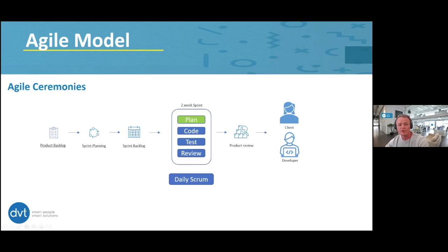So during the sprint, daily scrums are held, where developers provide updates and resolve any blockers or issues causing delays. This is a great opportunity for the Scrum Masters to check if the sprint is still on track. Scrum stand-up should be quick and take around 15 minutes. Any major issues are usually taken offline so as to not hold up any of the other developers. So the idea of the daily Scrum is to also promote open communication within the teams.